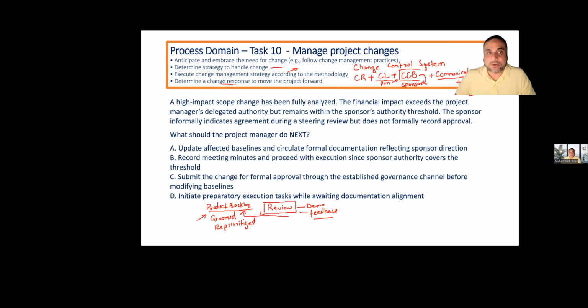It can also be a risk-adjusted or risk-updated product backlog, if the risk has changed accordingly, but only the product owner has the authority. In the predictive approach the project manager has the authority, and here the product owner has the authority to implement the change.